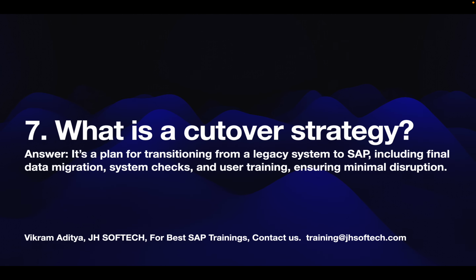So what is a cutover strategy? It's a plan for transitioning from a legacy system to SAP. Whenever we refer to a legacy system, we are referring to the non-SAP systems or the old system from where we are migrating to SAP, including final data migration, system checks, and user training, ensuring minimal disruption.